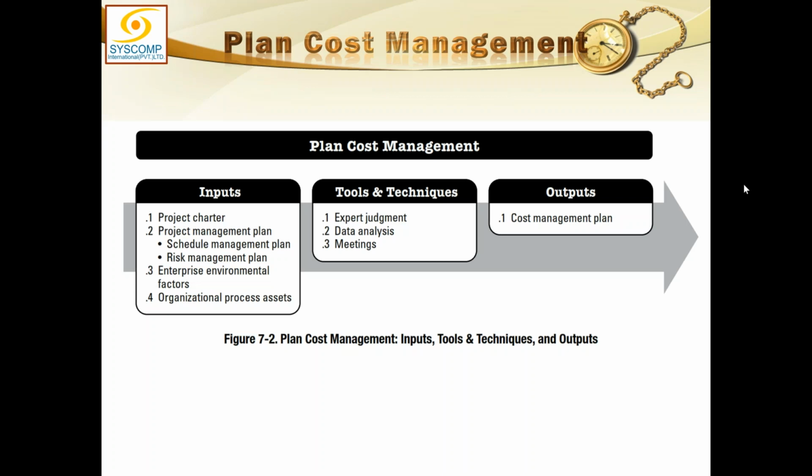Rules of performance measurement have to be established, and naturally for that, earned value management is to be defined. The rules for earned value management of how the performance is to be measured. For example, we define the points in the WBS at which measurement of control accounts will be performed. We establish the earned value measurement techniques, which method to use where, whether we are using weighted milestones, some fixed formula for the calculations, or percent complete, which is conventional in most of the projects.